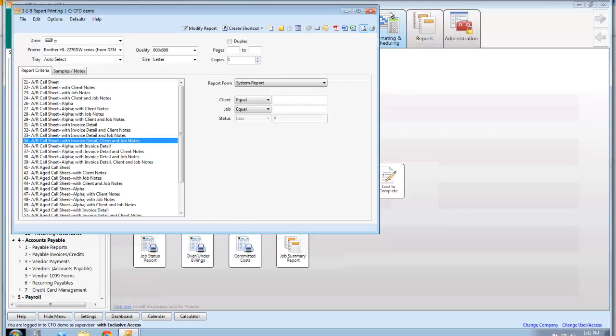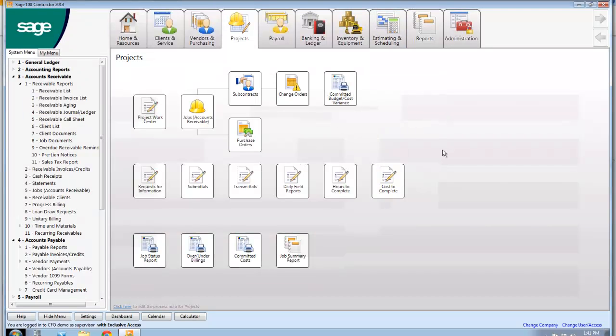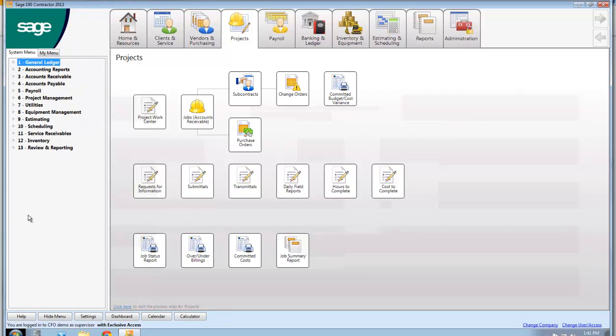So anyway, one of the things that this system does, it's made to make your life easier, and everything's integrated. And so the estimate goes over to a bunch of places. The job costing, as you probably are aware, in QuickBooks, if I pay you $20 an hour, $20 is all that goes to the job today. In Sage 100, the 20 goes in, your Social Security goes in, if there's a 401k match, if there's a health and benefit, there's vacation time, all of that cost is being put to the job as well. So you have fully burdened cost just like you estimated it.